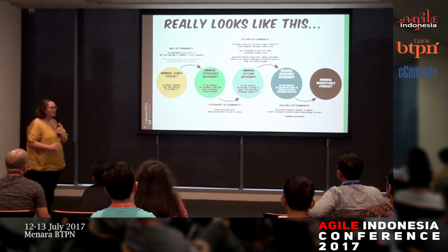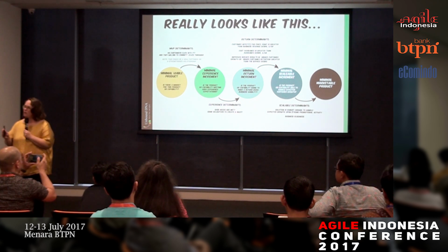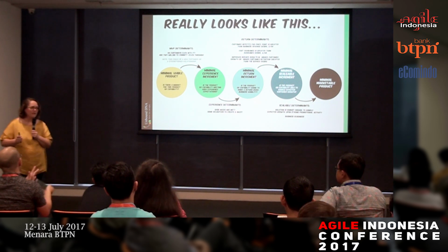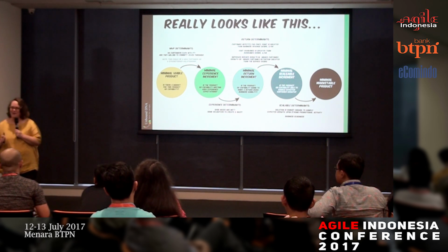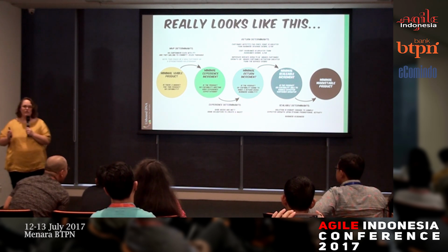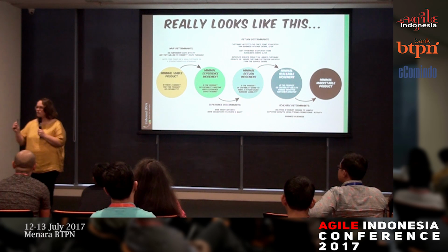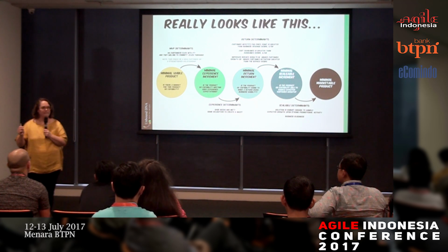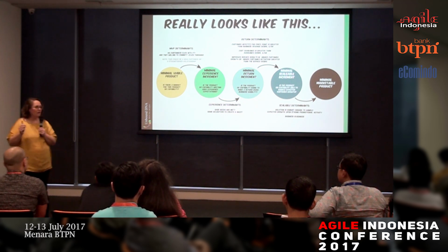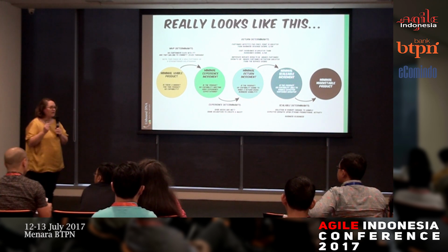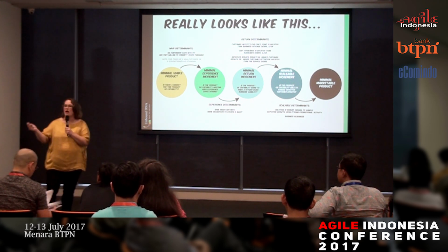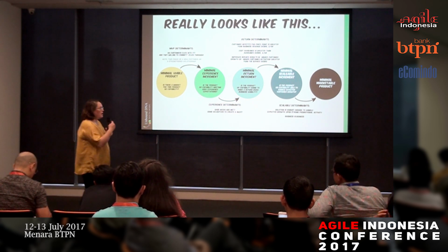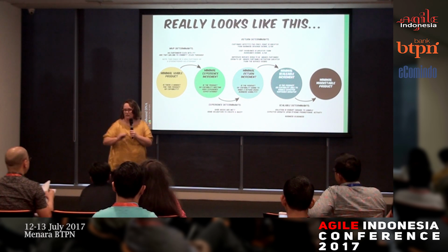So we would first develop a minimal viable product. Now, in fairness, people who are familiar with the term minimal viable product probably don't actually know the real definition. It's such an abused term. So what minimal viable product means is the smallest amount of work that you can get out there to a real customer to start learning from. The smallest thing out there. And then the whole point of doing that is, is there even a market for this? So what interestingly I found is you don't actually go out and market it at that point in time, just to be clear. That's not the time to do it.